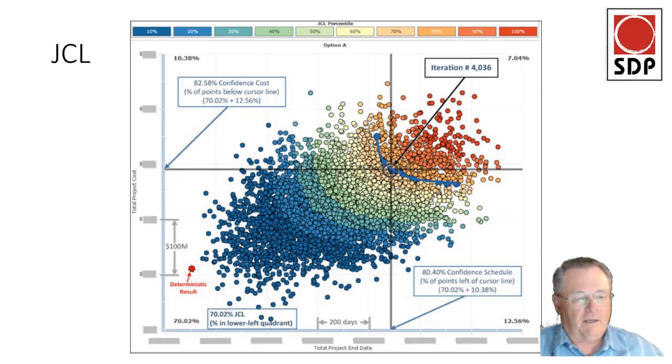NASA, I think, if you look at that timeline of yours, kicked PERT into touch some time in the 1980s, for the simple reason that there's an acknowledgement that you've done this plan, you've got this deterministic critical path running through it, but with the effect of uncertainty turning into risk because it affects an objective. There are a number of near-critical paths, and depending on whether the risk actually eventuates or not, those then become critical.